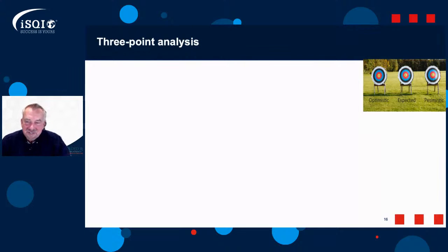This is the missing jigsaw for me. I used to do work breakdown structures, and I use that a lot in my estimation techniques, breaking things down to the lowest level and then bringing it back up, which is sometimes called microestimation. And when I was introduced to 3-point analysis, I thought, I should have used this for my work breakdown structure.